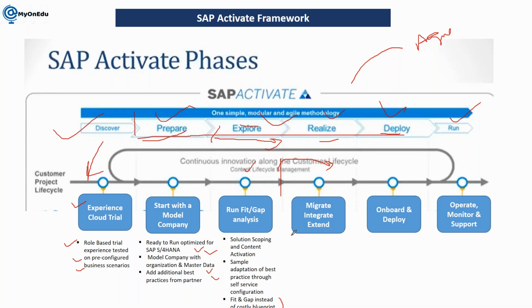For example, if we started with 10 requirements here, and we decided that out of these 10 we will give you 5 functionalities first, and in the second stage we'll give you the remaining 5. When we were delivering these 5 functionalities and discussing them, some additional things were added by the business, so they will be considered in the backlog again and taken in the new stage, or you can say a sprint.